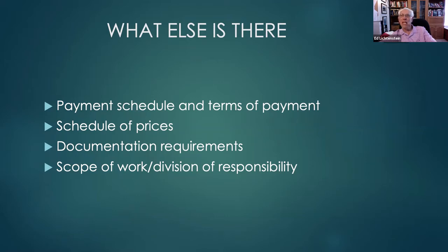If I'm supposed to give you something before you can complete your responsibility, and I'll use construction as the example, if I'm supposed to make a workspace available to you at a particular time and I don't do it, I'm in breach. It's going to probably cause a change on the part of my contractor.